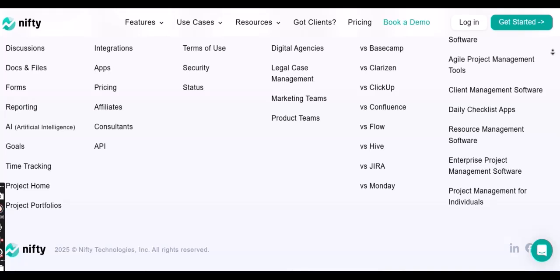3. Visualizing the timeline, leveraging different views for scheduling. Nifty offers multiple views to visualize your project schedule, catering to different preferences and project complexities. Gantt chart view. The Gantt chart is a classic project management tool that provides a visual representation of the project timeline. Nifty's Gantt chart displays tasks as horizontal bars along a timeline, clearly showing start and end dates, durations, and dependencies. This view is invaluable for understanding the overall project schedule and identifying potential conflicts.